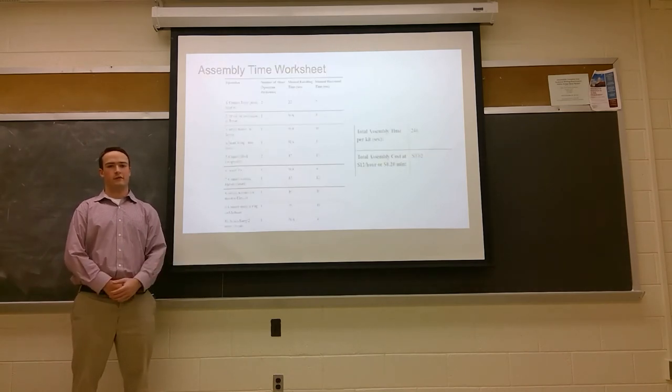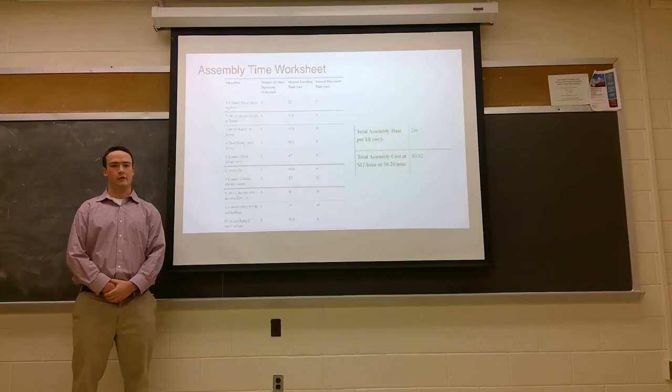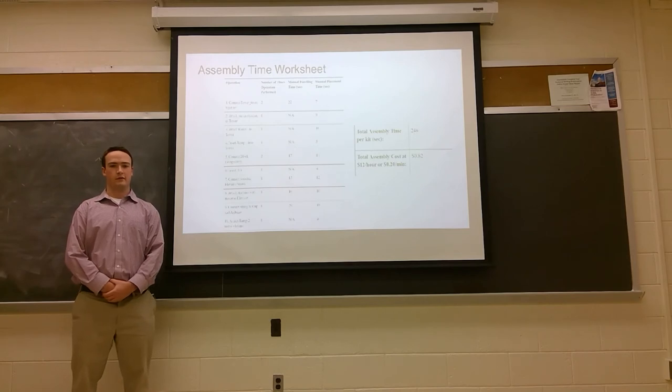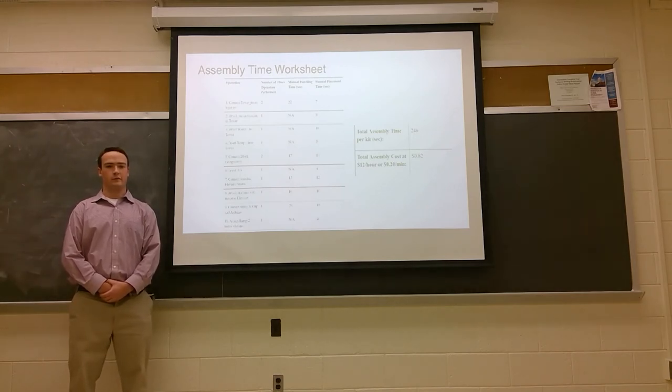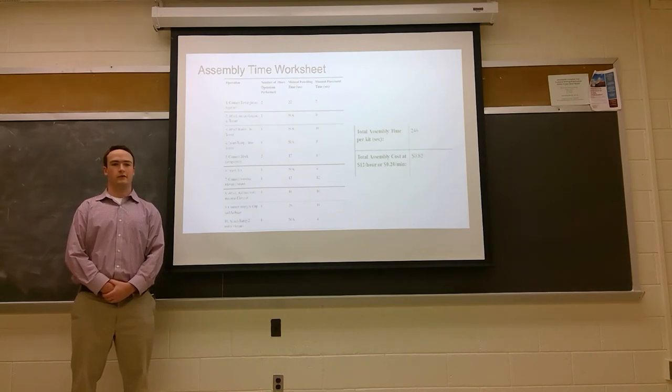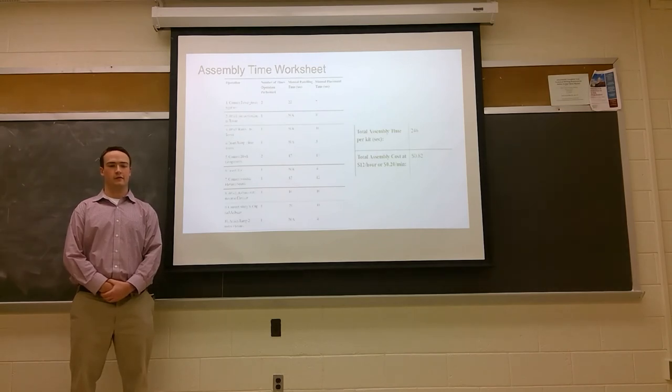These are the operations for assembling the team's BRG kit. Through actual testing and manual handling and placement, average times are found to complete each task and are also listed in the table. After calculation, total time was found to be 246 seconds per kit. The team then estimates the labor for assembly to be $12 an hour, or 82 cents per kit. The team finds this assembly cost to be very beneficial as it allows for more money to be spent on better materials and more effective manufacturing processes.